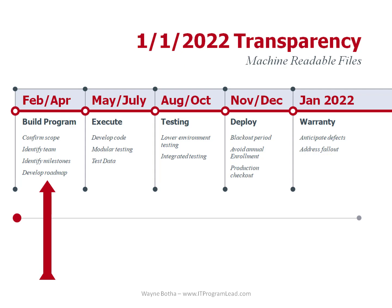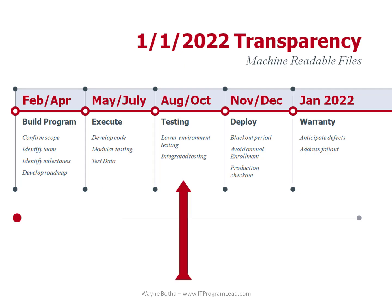During February and March, you need to establish and refine the program for this year. During the May to July timeframe, your teams must develop new code and enhance existing systems to provide the source data. You'll also need to conduct modular testing during this period. Around the August to October timeframe is when the program will really heat up because you have to get ready for deployment. Also bear in mind that in the summer months, many people take vacations.